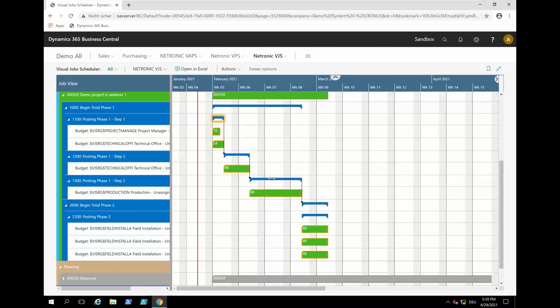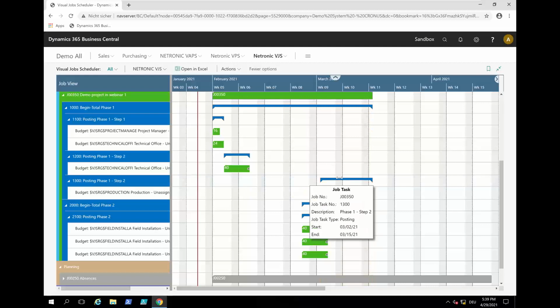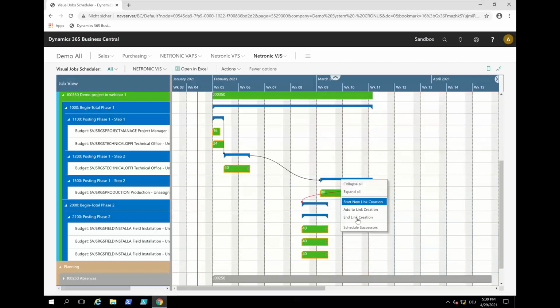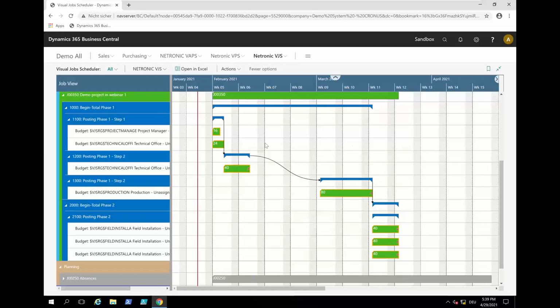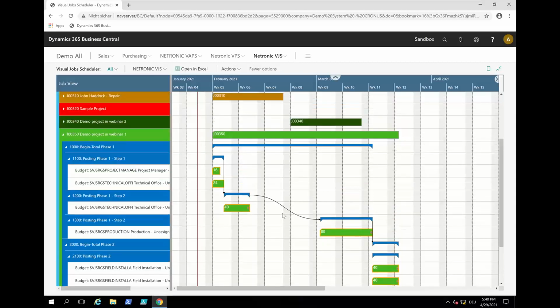And of course, if I move this task now because my production is delayed for some reason, then I again get the warning that the successors are not scheduled, and then I can schedule them. And Sasha, we need a wait cursor for this. But you see that you can define these types of dependencies.